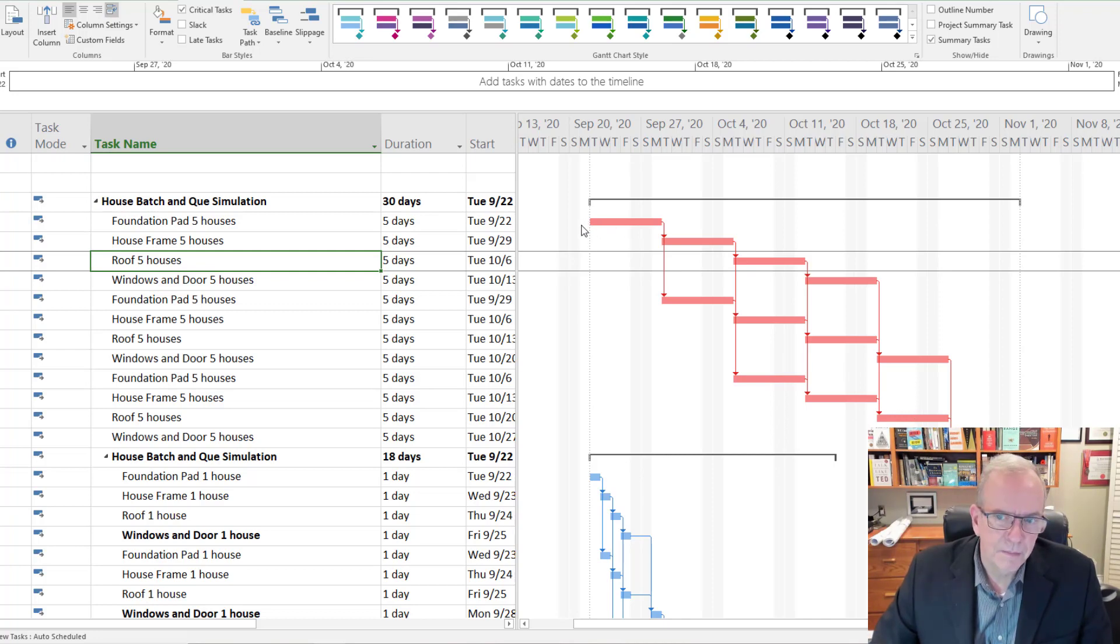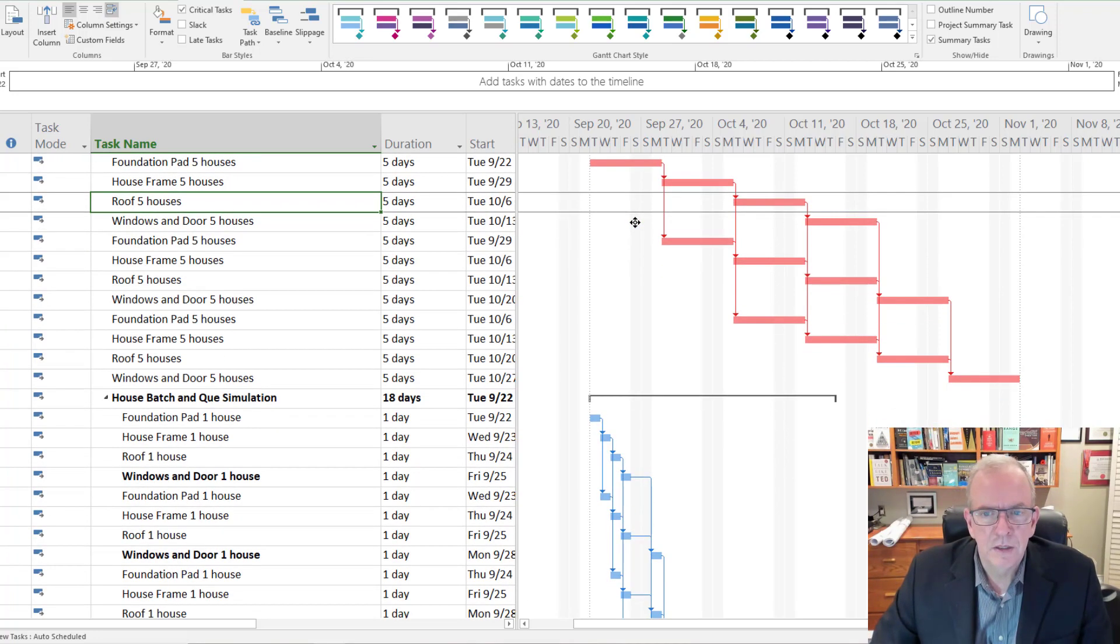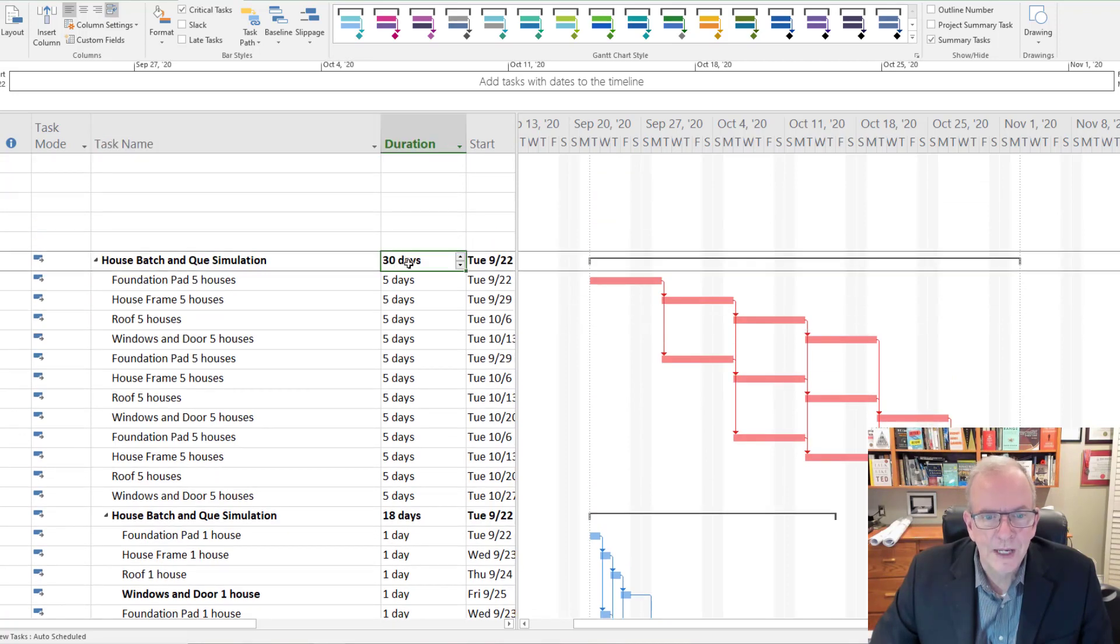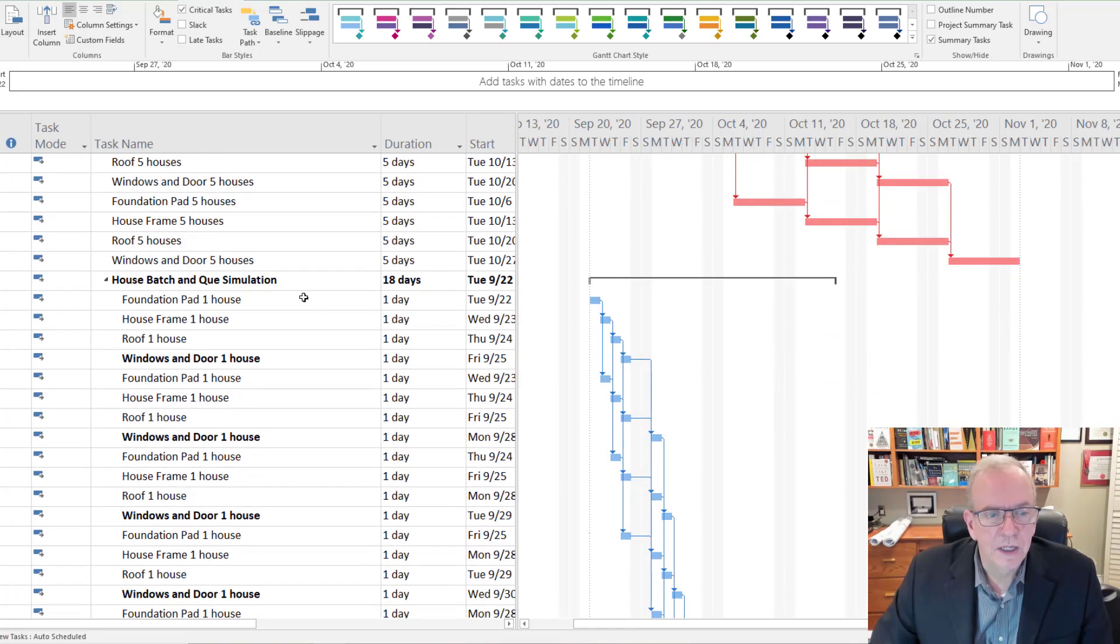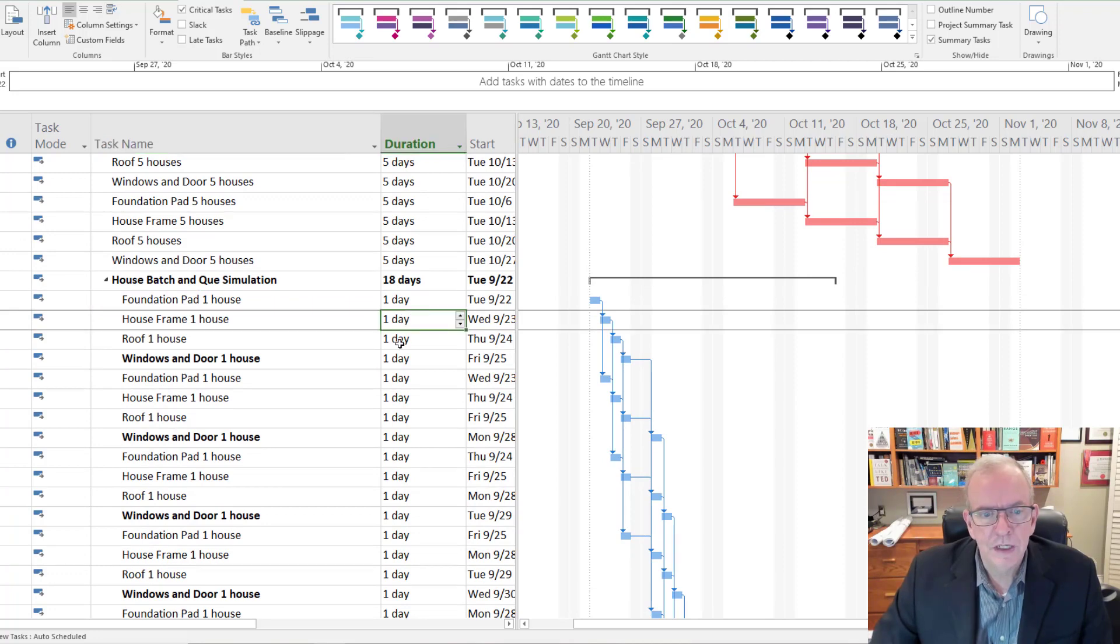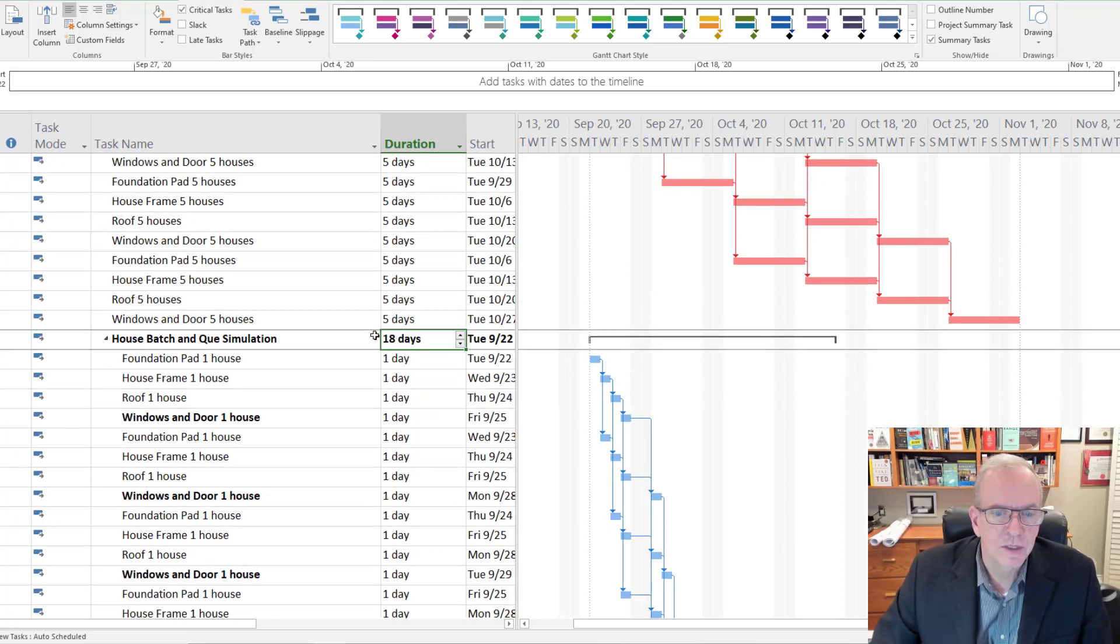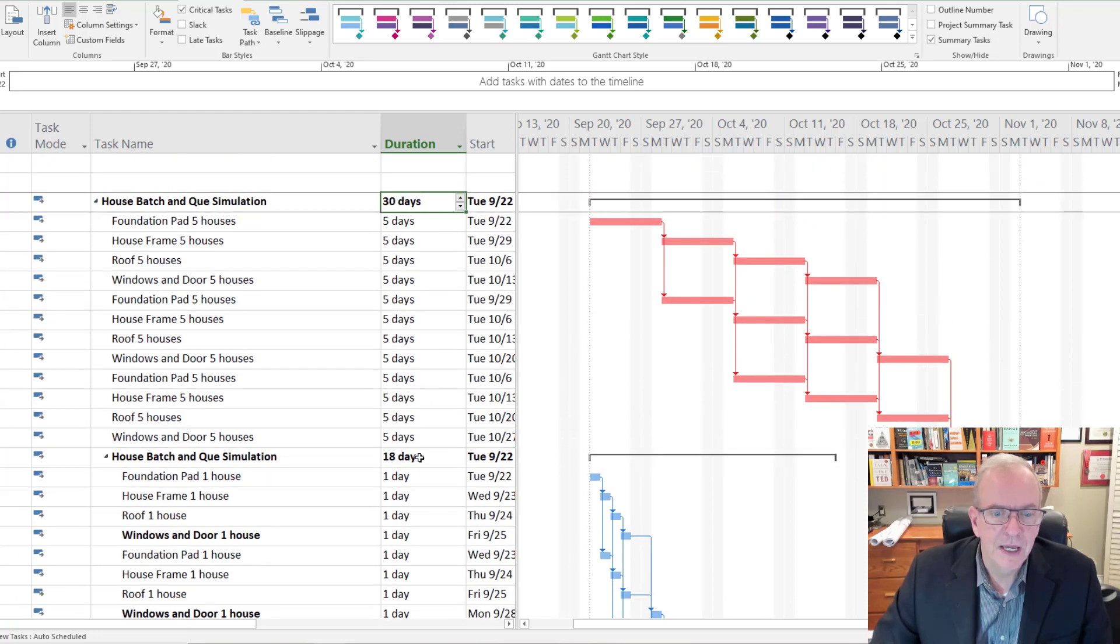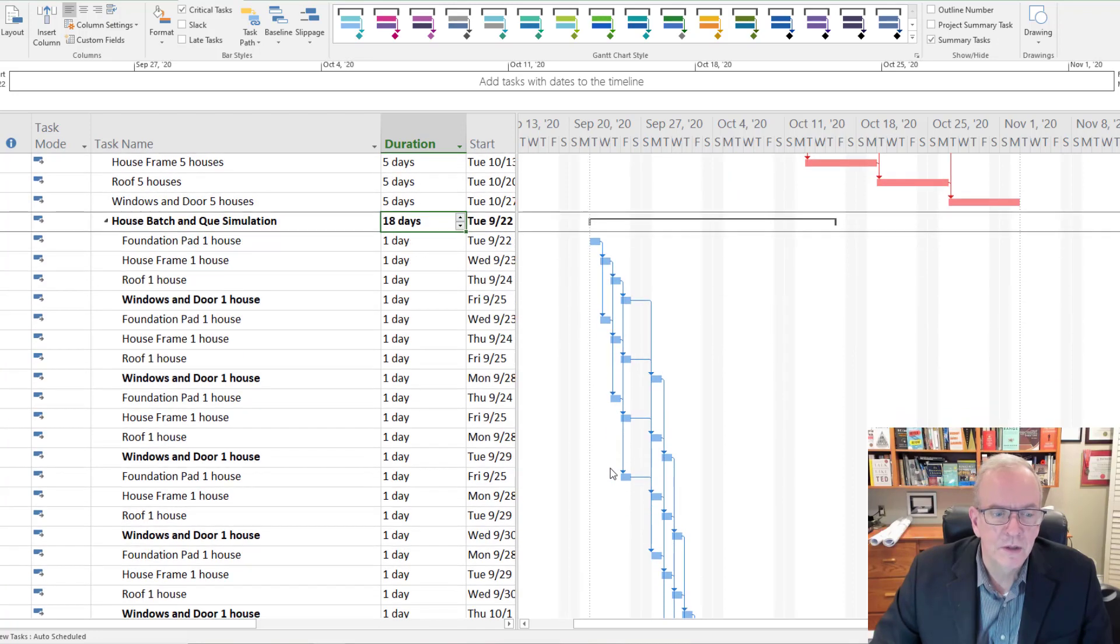I could shorten this, like I could make this start on the Monday, and then it would be just during the work days. When you start this on a Monday, then if you've got a little bit where you're behind, you can make that up on a Saturday, a bad weather day, that sort of thing could come into play there. But there's that flow. But it is taking 30 days. If we actually did that where we did single houses each day, and we flowed this way, then we see a much quicker effect. That substantially shortens the time frame, from 30 days to 18 days, and there's quick feedback loops moving into the mix.